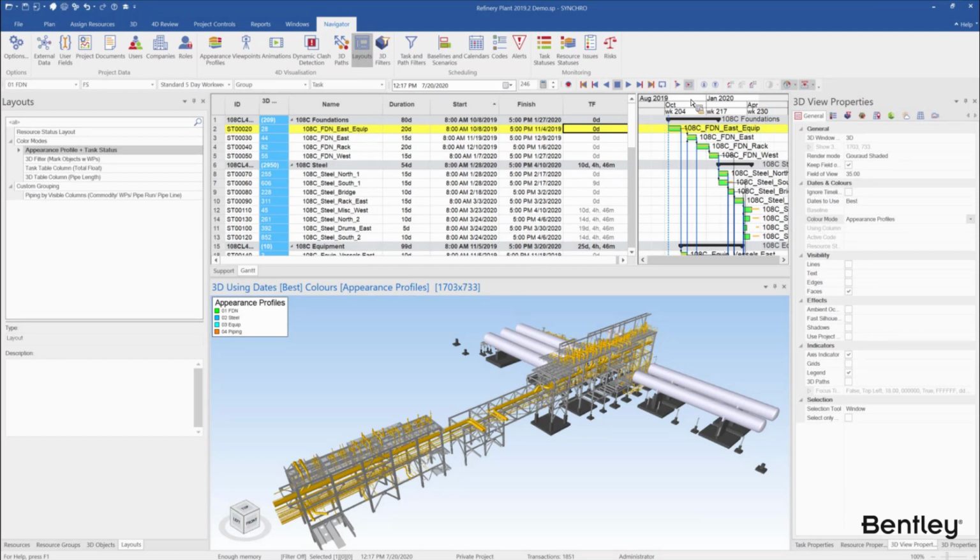This allows you focus time, no matter how hard you move it, how much you want to move it, when Ignore Timeline is turned on, you are seeing a static 3D model. It's not going to be a 4D model, and the time factor doesn't come into play. So that's another tip I want to provide right here.